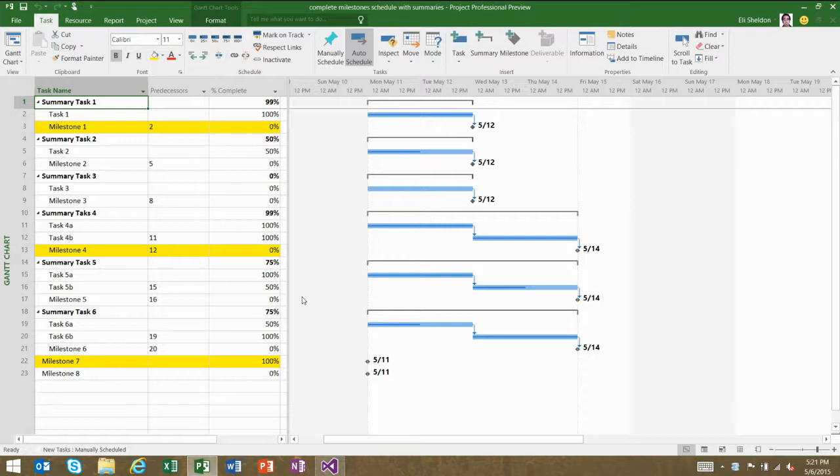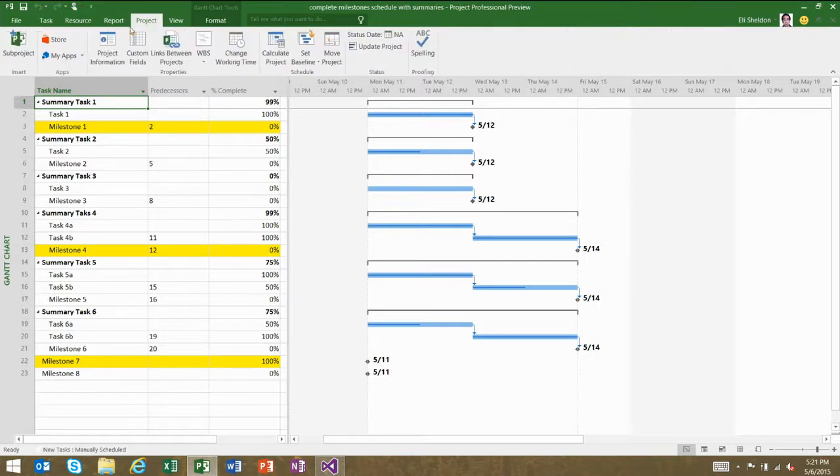Normally, you'd have to go in and manually update these or use an old school macro. So what this app is going to do is look for milestones whose predecessor chains, all the tasks that are linked to it, are going to be 100% complete, and then the add-in will mark them all complete. So I launch it by going to the Project tab in the ribbon, and then you'll see it's loaded right here under the Developer Apps section.